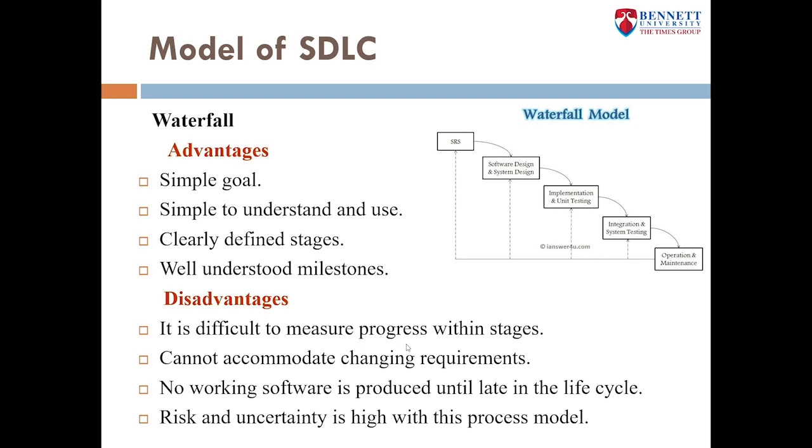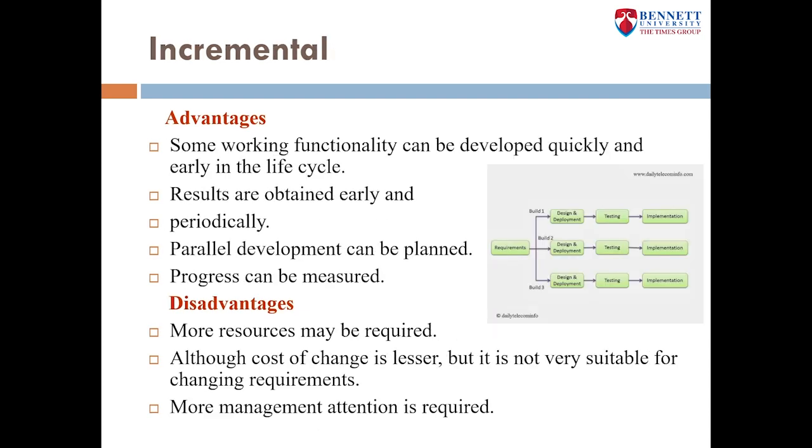Since the testing is done at a later stage, it does not allow identifying the changes and the risk in the earlier phases. So the risk reduction strategy is difficult to prepare. Now, moving on to the next model, which is incremental.